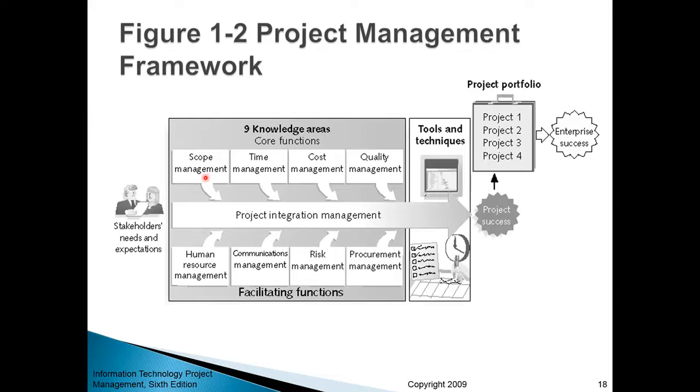Scope management, being able to understand and communicate to other team members what needs to be done. That's what we mean by scope. And also being rigorous and being methodical about defending the scope. In other words, if somebody wants to change the scope, there needs to be a formal mechanism for making those kind of requests. You shouldn't try to please everybody by doing everything that people request you to do. That's the surest way to set your project on a path of failure. There should be a formal mechanism for evaluating requests that come to you, requests in terms of changing scope, and also ignoring those requests.